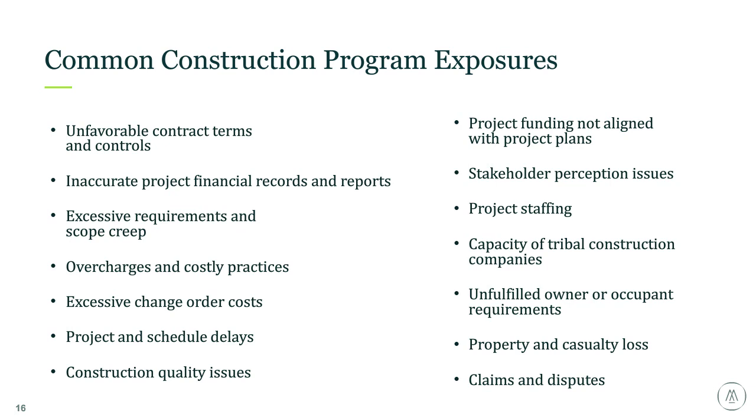For example, a common one we see is if your contract states actual labor charges are allowable. However, no limitations are specified within the contract. You could be getting charged excessive burden rates, labor rates, corporate personnel who are not on site at the project, for example indirect personnel like the CFO or CEO, and/or duplicate holiday, vacation, and sick time charges.